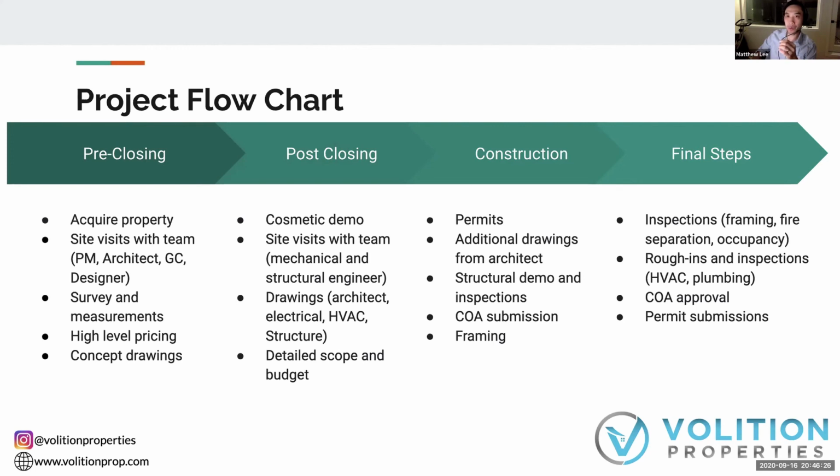So if you didn't know what you were doing and you thought, hey, I bought this house, I think it's great, I'm going to make this into a fourplex, I got my architect to drop fourplex plans, I submit them for permits, you get slapped with a roughly $180,000 development charge. And it's not because of ill intent from architects, but most people don't know how to do this.